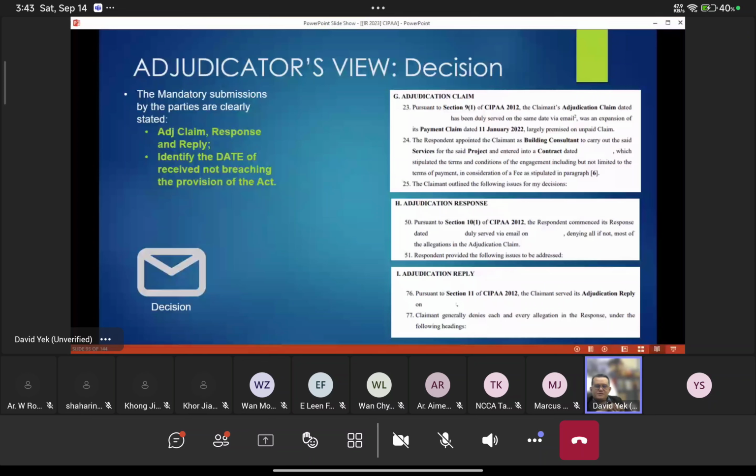Now, alternatively, recorded delivery is by way of AR registered post. You send the registered post AR, there's a yellow card behind it. Once the other party receives it, the yellow card will be sent back to you. But what does the law say about this AR register? It says that it will remain valid unless it is disputed. That means it's acknowledged to be received unless the person who received it disputes that he has ever received it. That's what it means.